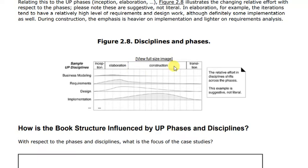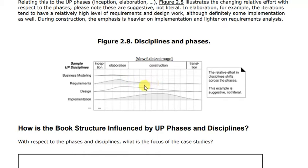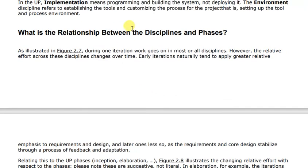The relationship between disciplines and phases is shown in a diagram. In every phase we can see how much effort goes into Business Modeling, Requirements, Design, and Implementation. In Elaboration, there is a lot of Business Modeling and Requirements work focused on design. In Construction, the emphasis shifts to implementation.